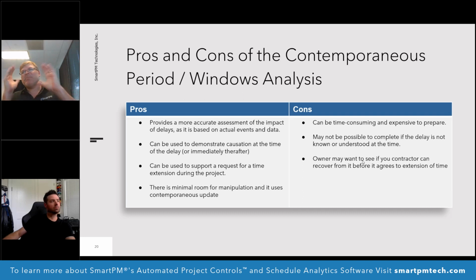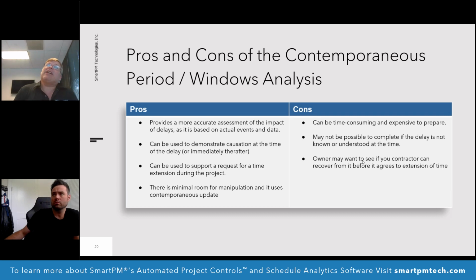When the contractor submits the claim at the time, the owner should be understanding of the fact that this is going to be a harder lift now. What they always want is to get done on time, but I have noticed the further out you start asking for an extension of time, the owner has to make a decision as to whether or not they want you to accelerate, which in some cases they're willing to pay for, or sometimes they're able to adjust the date for which delivery is going to be and plan around that.